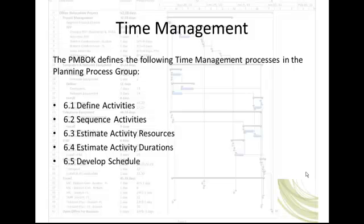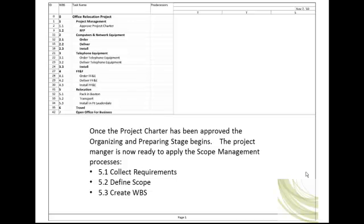This lecture will demonstrate the application of these processes using an office relocation project. Once the project charter has been approved, the organizing and preparing stage begins. The project manager is now ready to apply the scope management processes: collect requirements, define scope, and create WBS.